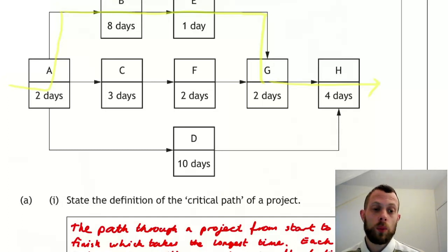So imagine we need the equipment for 1 day before the end. Well, then you would be needing the equipment on the beginning of the 25th of February, which would be 1 day before the 26th of February. So we need this equipment at the beginning of activity D. So we need it 10 plus 4 equals 14 days before the end of the project.